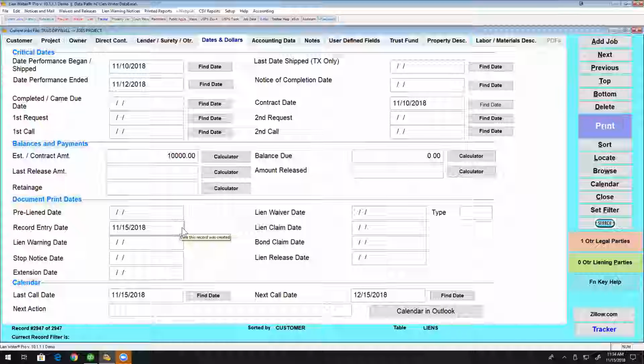Now, why is this important? It's because California does not allow amended preliminary notices. We had a big to-do with that back in about 2007, and the courts, all the other courts in the nation said, no, of course you can simply extend a preliminary notice. No, they said you've got to do a new preliminary notice, so that's what you've got to do. Can't emphasize that enough.